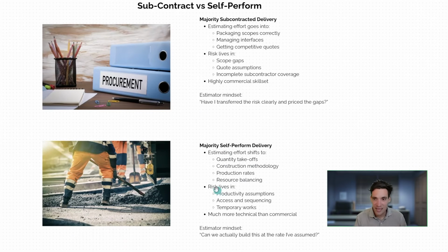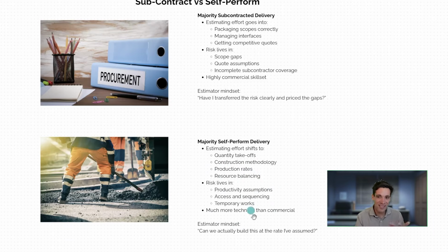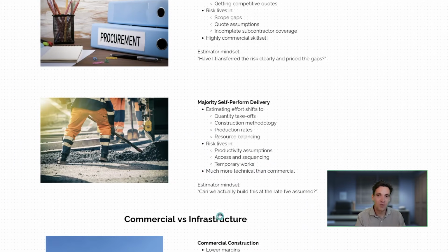Self-perform estimating, again, this is pretty much similar to the head contract subcontract split, but for when you're self-performing the work, it's much more technical. It's much more about accurate quantity takeoffs, getting the right methodology, and then plan and productivities to reflect that, and making sure you're fully utilizing your resources. The risk is going to live in your productivity assumptions, your methodology assumptions, the access and sequencing, things like temporary works. It tends to be much more technical than it does purely commercial.